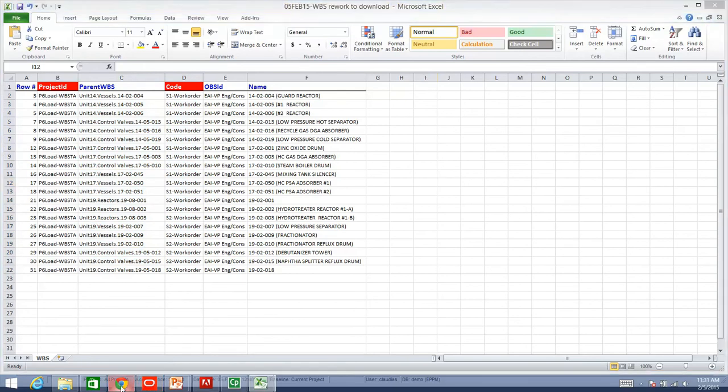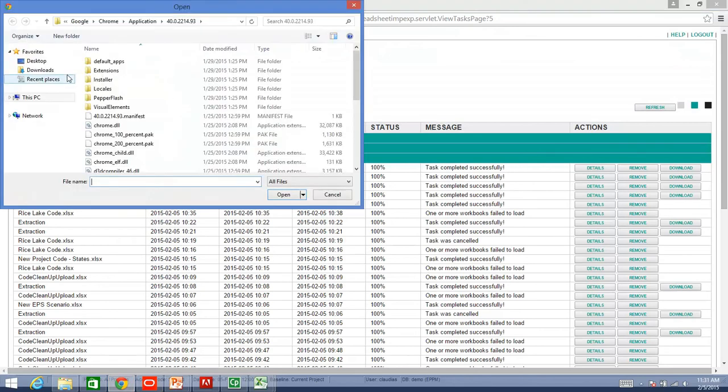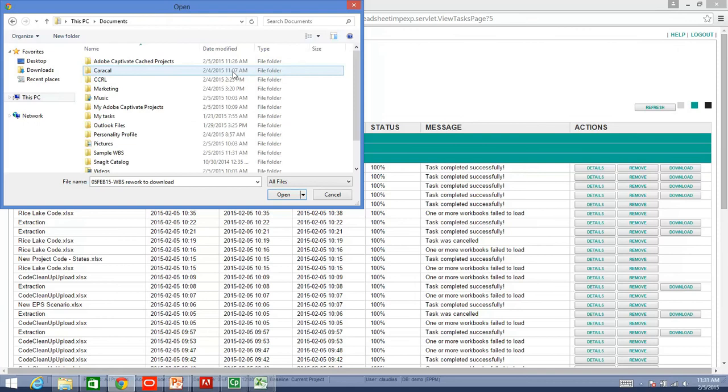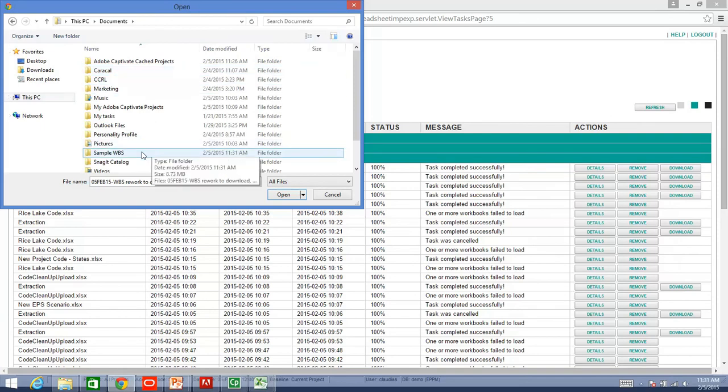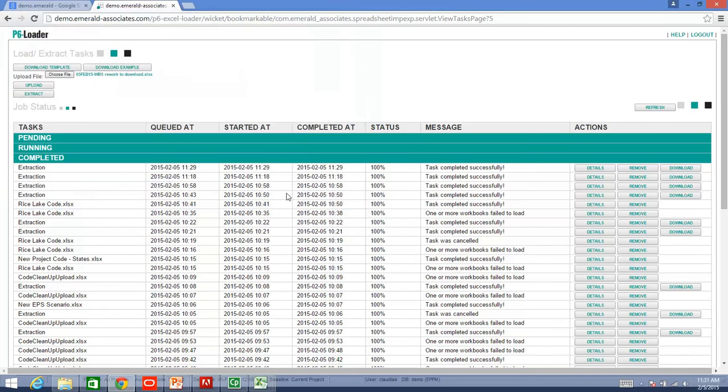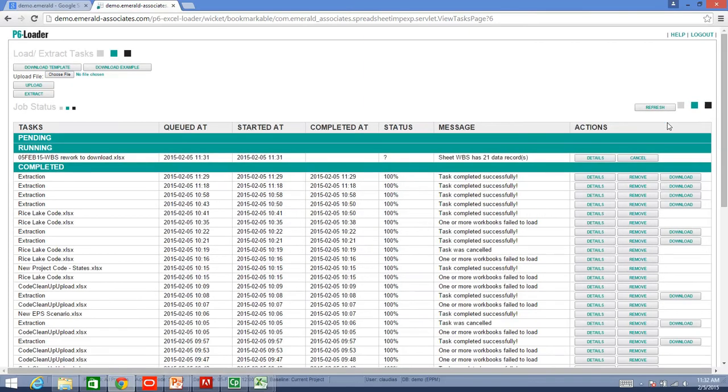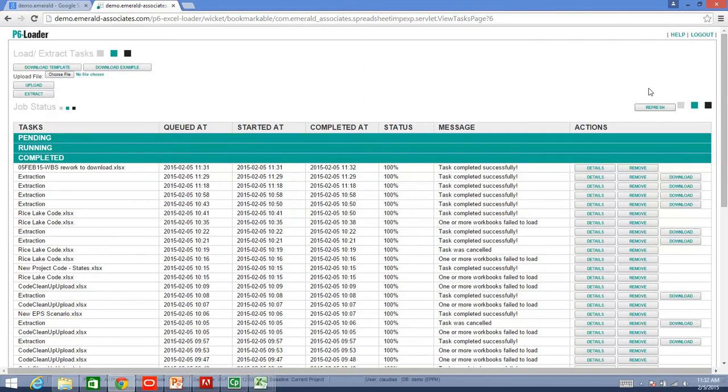I go back to P6 Loader. I am going to say choose a file. I am just going to select sample WBS, and I will select the file that I have reworked to download. I will say open, and then upload. Then, I am just going to refresh once more. And, the task was completed successfully.